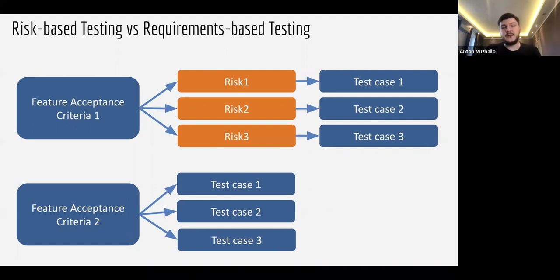So at the beginning of the sprint, nobody knows how it will be implemented, usually, because nobody does the detailed requirements at the beginning due to ceremonies and rules. So we're going to work further, and the test engineers don't know how to test this product at the beginning. They only understand how to test it at the end, when development finishes their work, because then they say, okay, now I see how it's implemented, and now I believe I know how to test it. Let's say you have a sprint duration of 1 week. Your developers are finishing their work on Friday morning, and you're starting your testing on Friday morning. So you have only 1 day or even less to test all that.